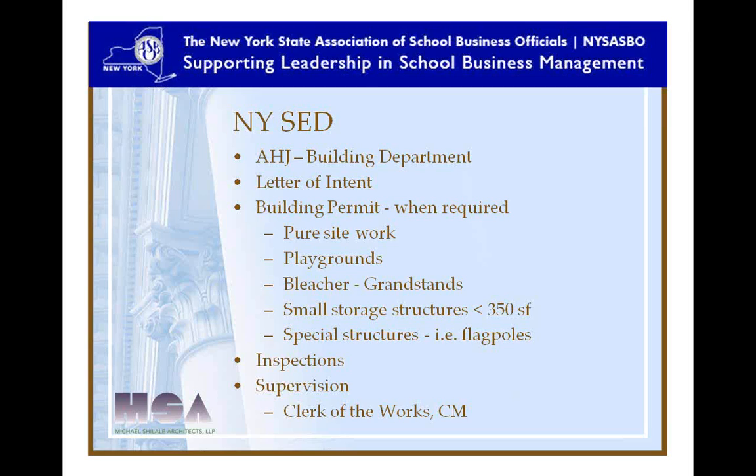But some of the caveats are to be careful about those EEBs, because each building you do work in has to have an EEB done, and that can drive some improvements in each building. And as I said before, your building condition surveys can also require you to include some items in your scope of work that were health and safety items with a life expectancy under 5 years.